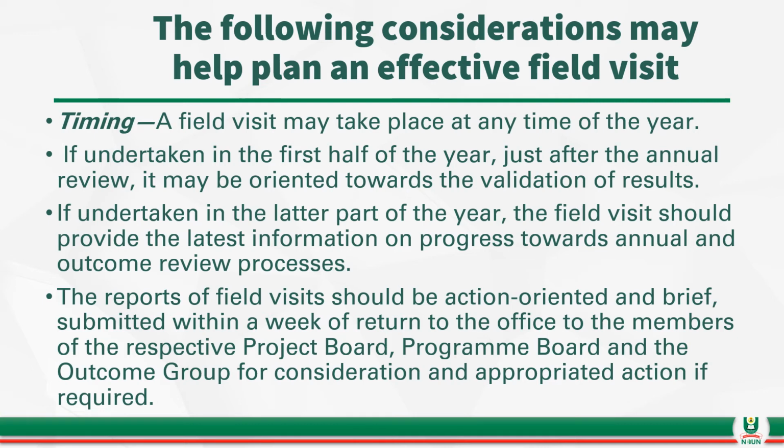And if undertaken in the later part of the year, the field visit should provide the latest information on progress towards the annual and outcome review process. So if it is done later in the year, definitely you should be able to know, by the time they are bringing the annual report, that this is the progress this program has made or not. The report of the field visit should be action oriented and brief, submitted within a week of return to the office to the members of the respective project board, program board, and the outcome group for consideration and appropriate action